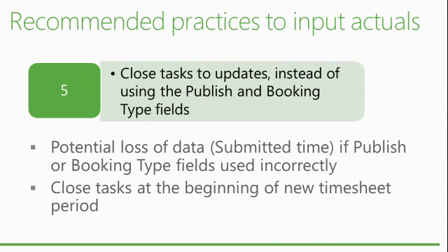If she's going to do... Yeah, no single entry mode, and then you can import. Yes, so that you don't have, yes, yeah. But if you allow to use the timesheet, for example, then I would use single entry mode because then you have everything in one screen. You have the assignments and you have the non-project time with all these categories that you define, and the users have only one page to input, and they will always like that better than having two screens to deal with, and the import and everything. It's a little bit more complicated to do.